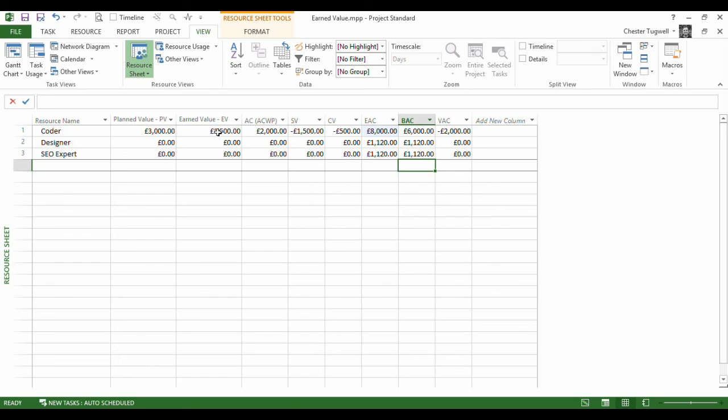So the actual cost of the task is £2,000 up to the status date, whereas according to the baseline cost of the task, because I've only done 25% of it, it should have cost £1,500. And my planned value is £3,000 because this is what I should have completed by now. So you can see we start to get a difference between these three values.